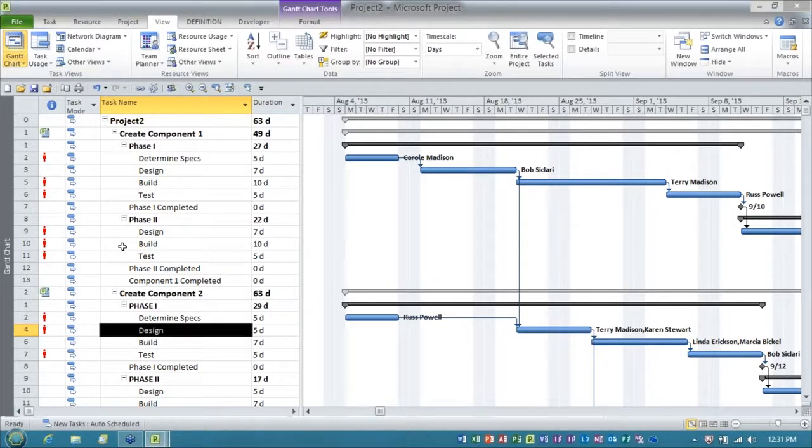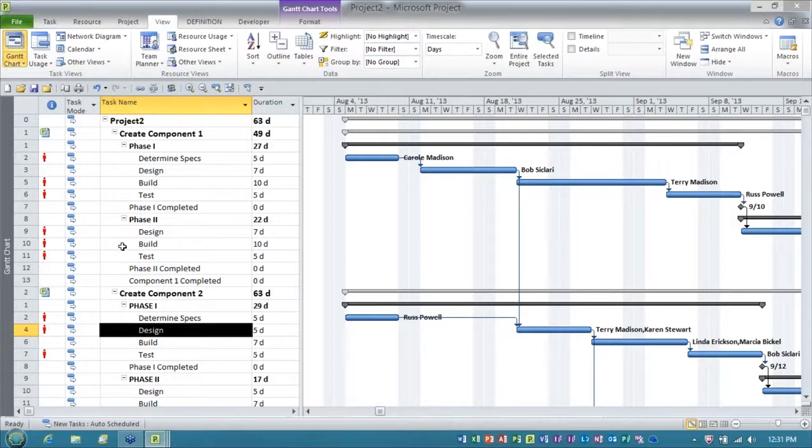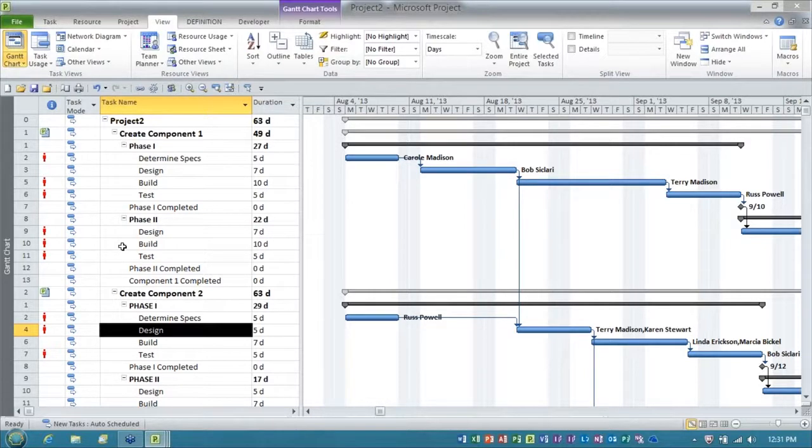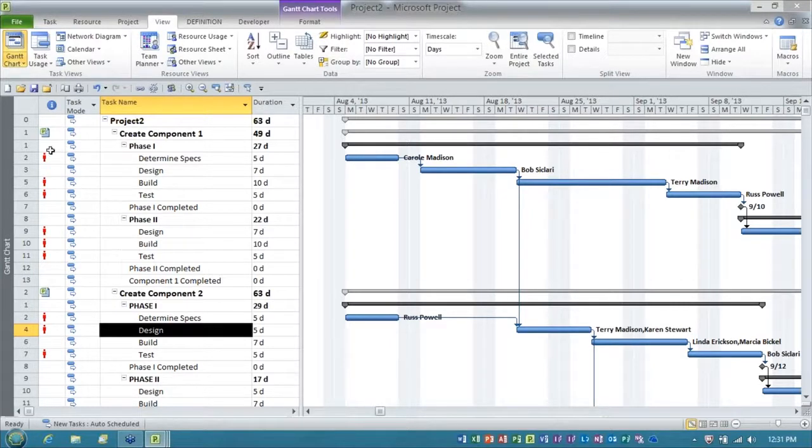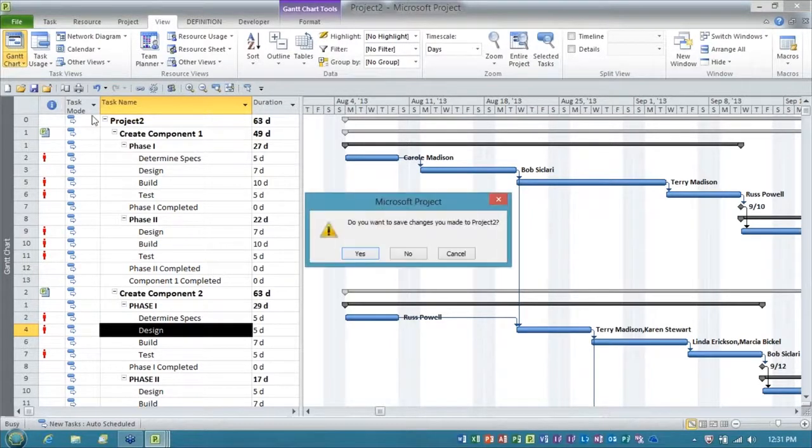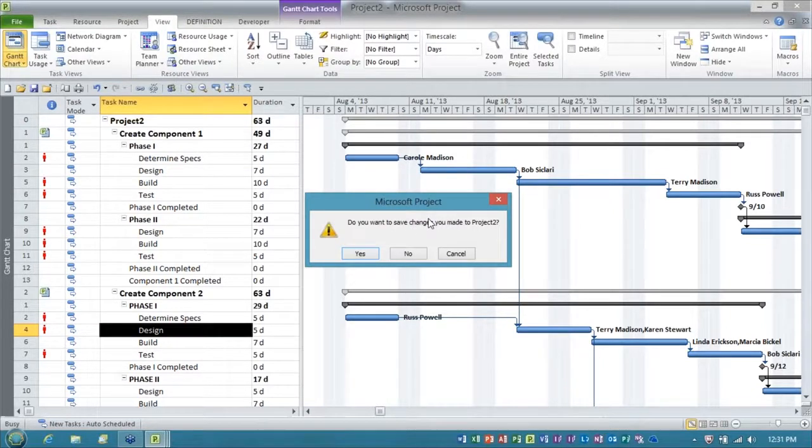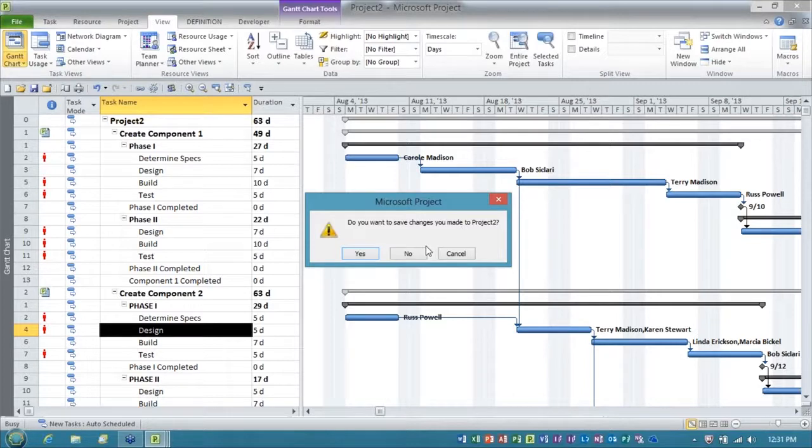So once you're done with any analysis or changes that you want to make in the temporary master, folks, this is going to blow you away. You just close the master, and you don't save the changes. So watch this, everybody. I'm going to click my close button, and it's going to ask me, do you want to save the changes made to project two? That's my temporary master. I'm going to say no.